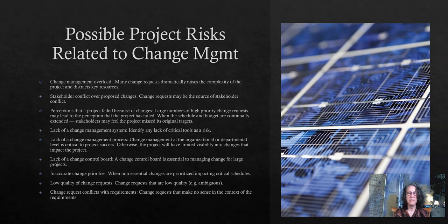Now, related to change management. Unfortunately for this project, all of these items apply to this project. And the enormity of the risks in this change management area can signal that perhaps a project is trying to accomplish too much too fast. And this is something that the people involved with the project could sense even before the design phase began. There was a sense that things were too good to be true.